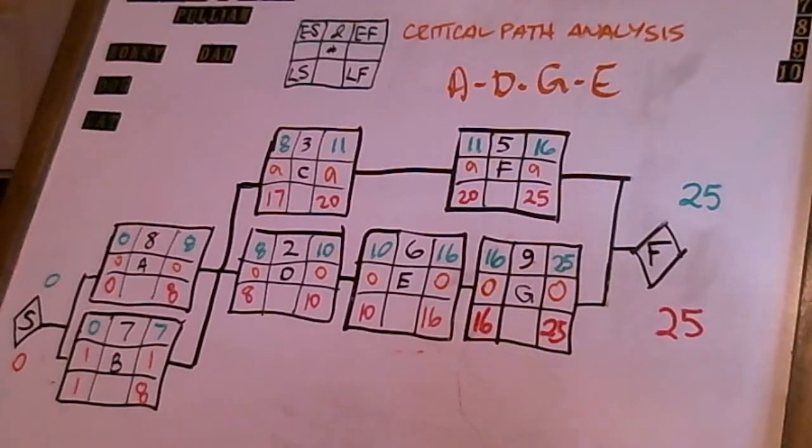So now when we think about critical path, one thing we need to understand is that in identifying the critical path, we need to know what is meant by float. And float is also called slack as well. So when you hear the terms float or slack, you're really looking at an additional amount of time that can be used by an activity to get done. And so when you hear about an activity having float, it is essentially going to be on a non-critical path. So if you look at our particular network diagram, you see three activities that actually carry float.